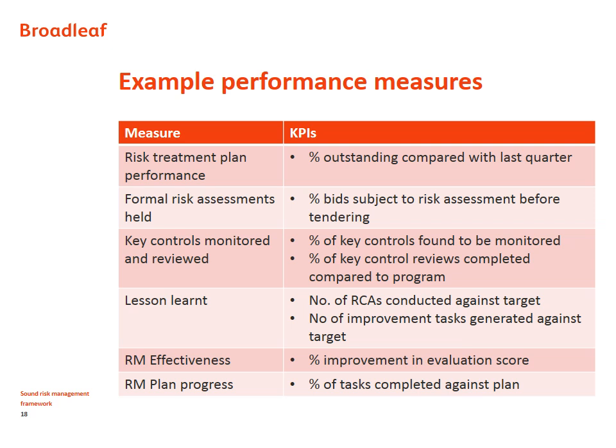They felt that it was important that risk treatment plans were progressed, and therefore they wanted to measure the percentage of risk treatment tasks outstanding compared with the last quarter. Secondly, being a contractor, they want to ensure that there is good risk assessment associated with tendering, and in particular that bids were subject to risk assessment before tenders were submitted.